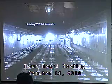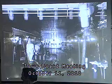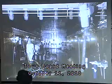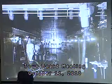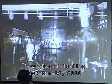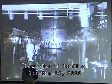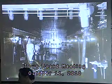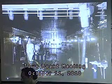Picture here, same angle, but halfway through cleanup, same room. Cleanup took 10 years. It cost approximately $7 billion. You see these moon suits here. You see they have these cords going. These are actually double air respirator suits. So they've got this air coming in, and then you'll see in another picture where they're actually wearing masks. Very, very, very dangerous industrial work, and then you add on top of that the radioactive and hazardous component to it. Very hard work.